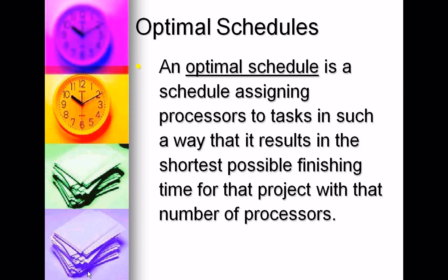Now there's one thing that's going to help you check your work. If your completion time is less than your critical time, you've made a mistake somewhere. Your completion time will never be less than the critical time. Because remember, critical time is the shortest possible completion time.